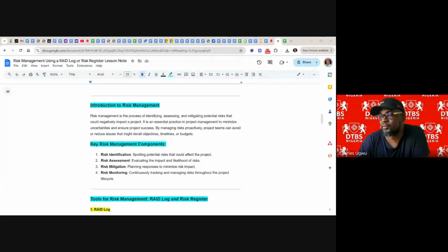Not inadequate. Before we can start a project, we must have carried out an evaluation to make sure we have enough budget. So anything we're planning should be within the budget. When we have started the project, we cannot say that. I think what you mean is budget overrun, overshooting our budget, not inadequate. Inadequate means we didn't make enough budget from the start. It means that the project manager or the business analyst that carried out the evaluation did not do a good job.